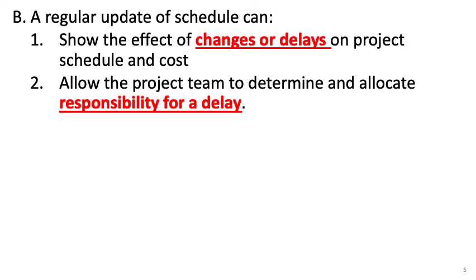Okay, so why do we need to develop an updated schedule? An updated schedule can show the effects of any changes or delays on the project schedule and costs. Let's say for some reason you have to delay the start of a particular activity. If this activity is on the critical path, this delay will extend the project duration for sure.